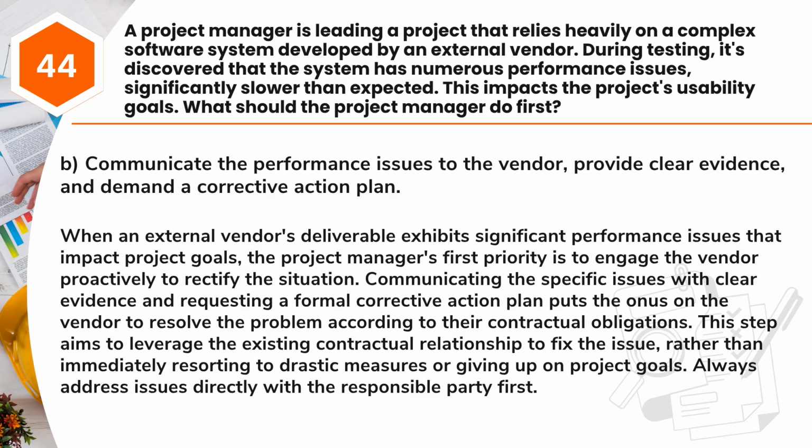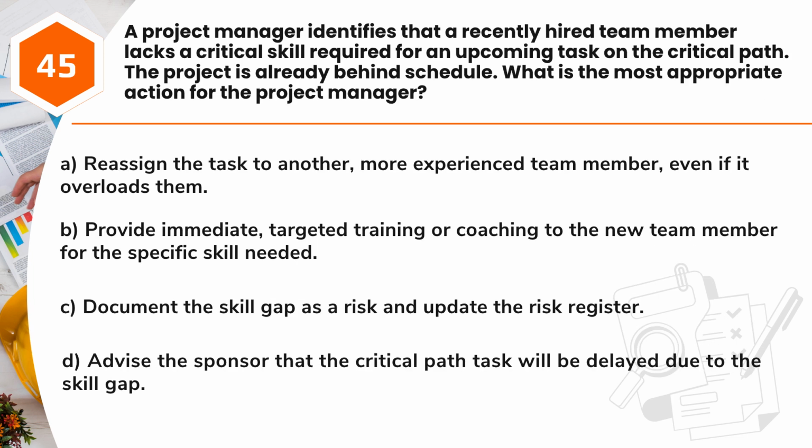Communicating the specific issues with clear evidence and requesting a formal corrective action plan puts the onus on the vendor to resolve the problem according to their contractual obligations. This step aims to leverage the existing contractual relationship to fix the issue, rather than immediately resorting to drastic measures or giving up on project goals. Always address issues directly with the responsible party first.